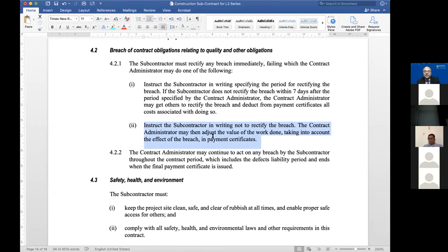They shouldn't have complied because you only comply with the contract administrator, the architect who was administering it. And then what happened was, well, technically that's a breach, but the value of the works was actually more because it's a better quality and so on. So look, don't devalue. You just don't go and remove the brilliant lights and put a lousy light or whatever. Just adjust the value of the works, okay?